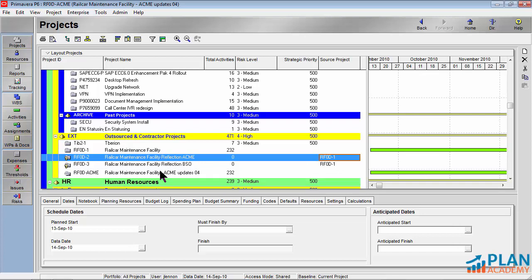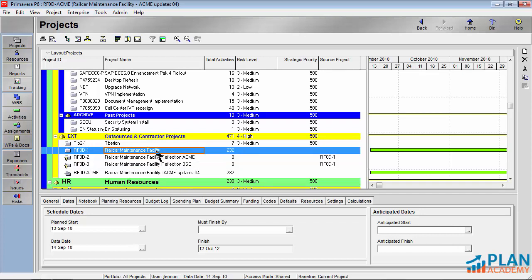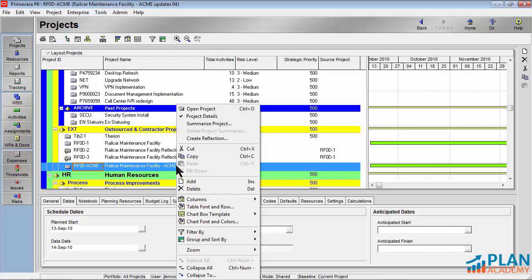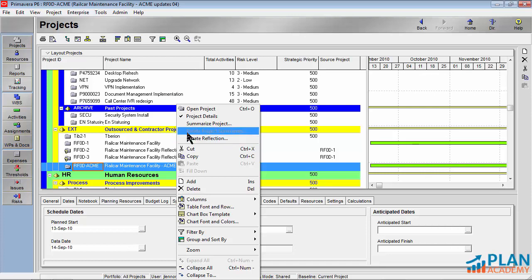The reason I wanted to bring this up is that there is a bit of a gotcha. And that's why I wanted to outline these setup steps for you. If you send this XCR without creating a reflection project over to your subcontractor and they update it and bring it back, we don't have the ability to do the merge. For example, look at this project. This is one that came back from ACME. And notice it has no source project linked to it. So I can't really do that merge functionality. The option doesn't show up.